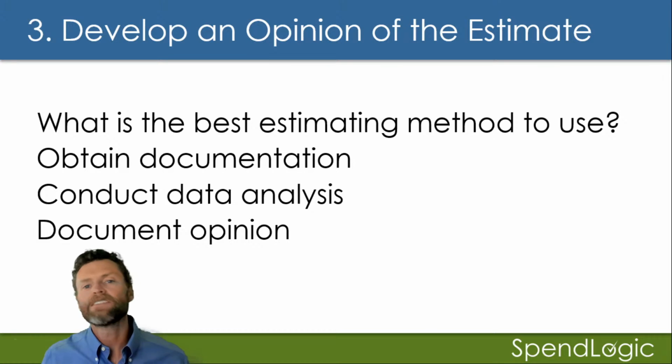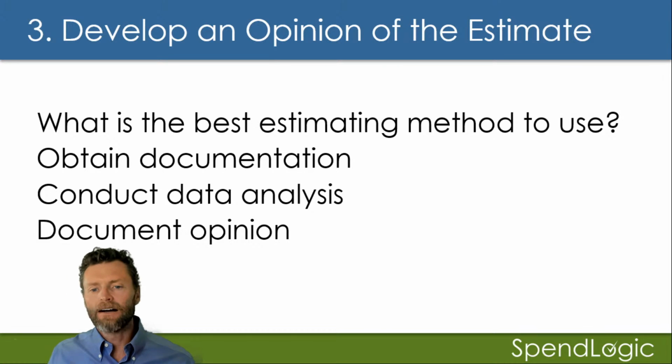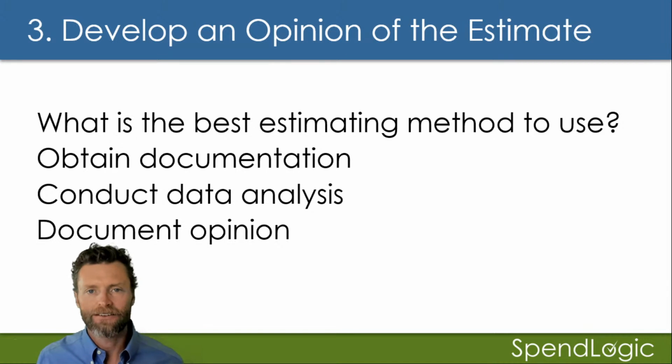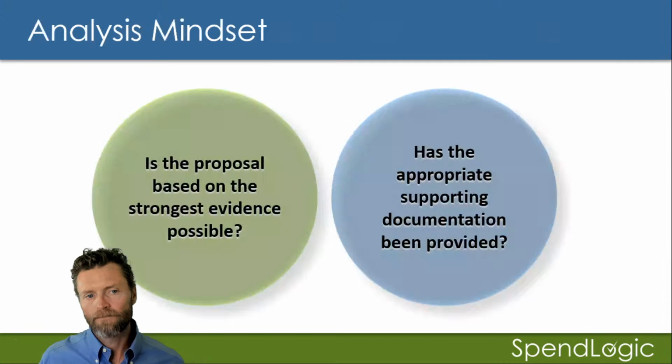Third, develop an opinion. This is your analysis. And obviously, this is the most complicated part of it. How do you do an analysis of their hours? Well, let's get into it. These are the questions that you need to ask. What is the best estimating method to use? I know what they have, but what do I know about this? What should they be using? And then compare the two of them. Obtain documentation, conduct your data analysis, and document an opinion.